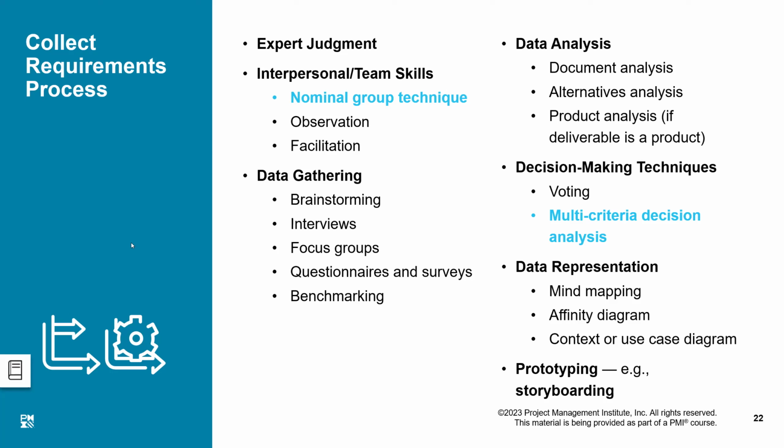Okay. Document analysis could be the previous projects we have done, the previous initiatives we have taken, or the way the operations are happening in the organization. There are a lot of documents available in the archive. We can refer back to them and see that similar requirements existed and they were important, or they were not important.